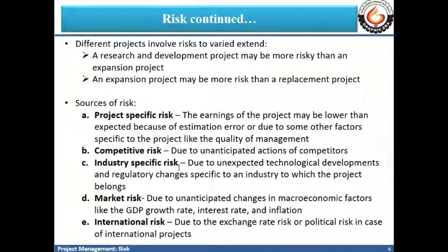And in case you are an international player, you are having international projects, then you would be dealing in foreign exchange, and often because of foreign exchange fluctuations or maybe political instability in the involved countries, there might be a risk which is known as the international risk. So there are multiple sources of risk involved, and we need to take a look and understand them so that we can manage them effectively.